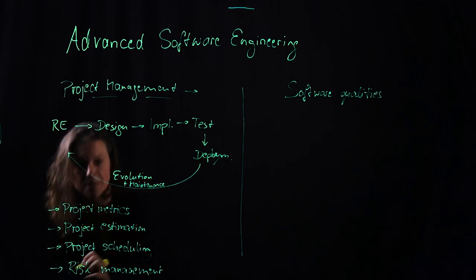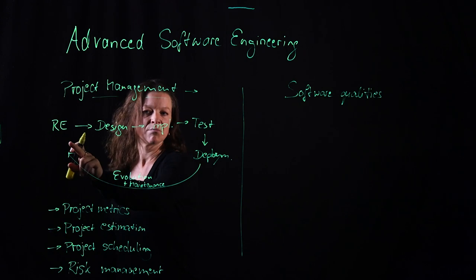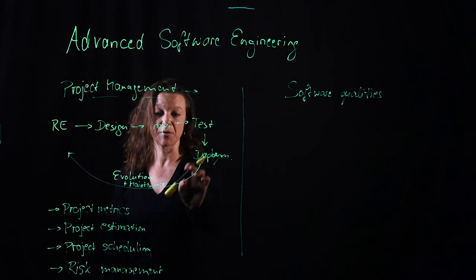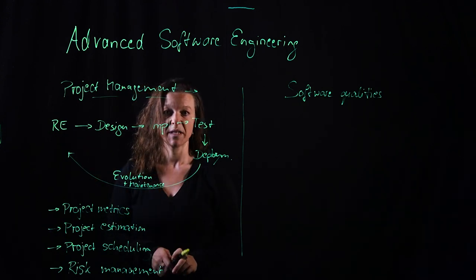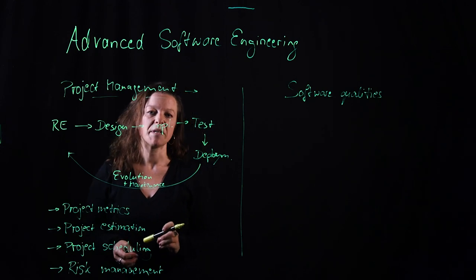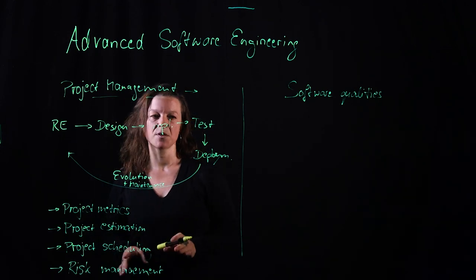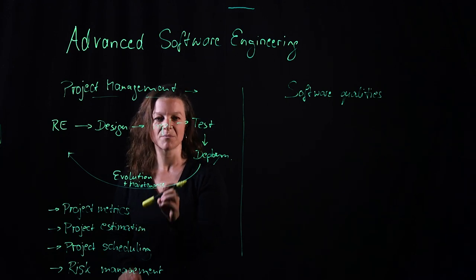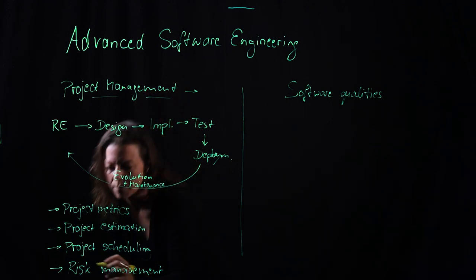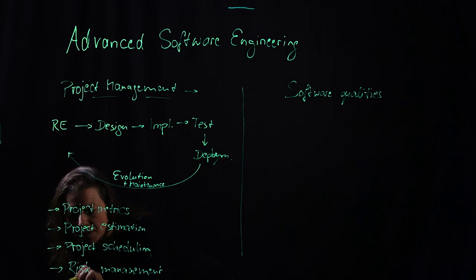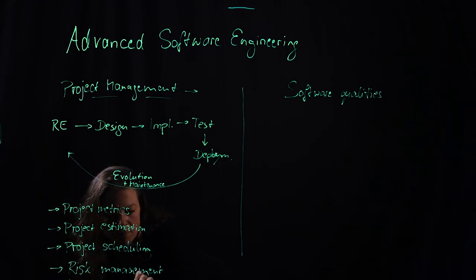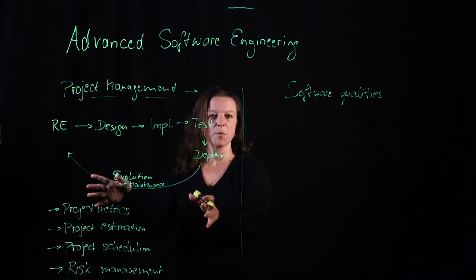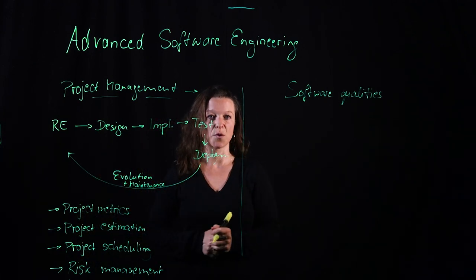And then last but not least this innocuous arrow down here that says evolution and maintenance turns out that for many software projects more than 50% of the costs go into the evolution and maintenance phase. So therefore we should take some time and look into that as well. So maintenance of software over time. That's what we're going to be doing for the first half of the course.